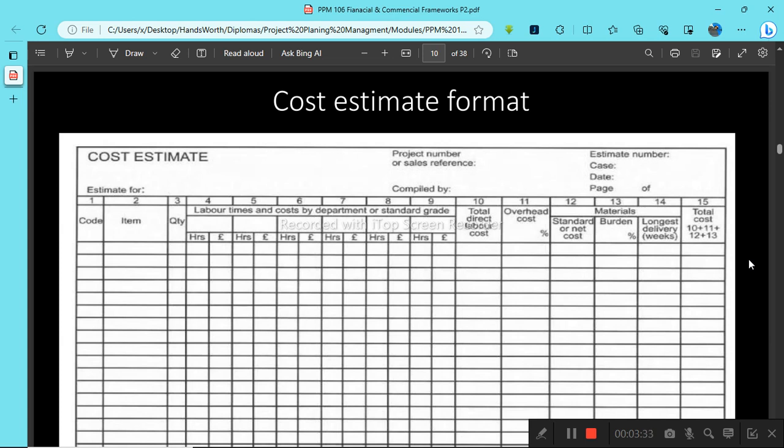So we can look at the quotations from other projects that were given for those same activities, and then use those to estimate the cost for each given activity. And then once we are done, we can sum up and make a total estimation by adding all the estimated costs for each given activity that we have compiled and listed down, thereby being able to make a total estimated cost for our entire completed project.